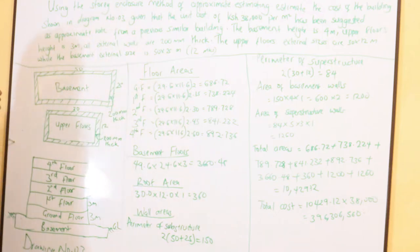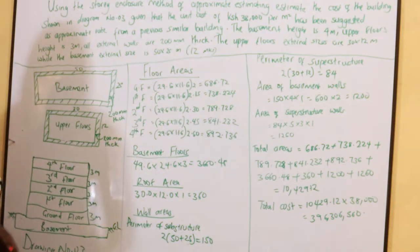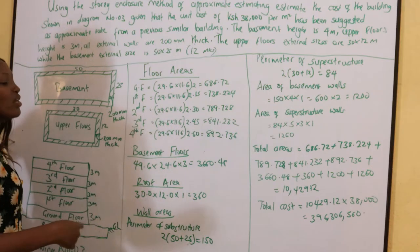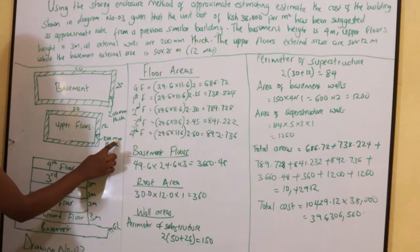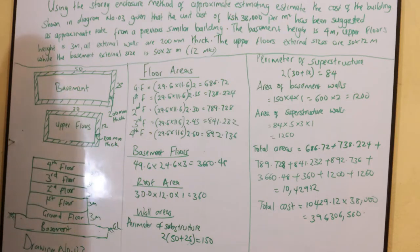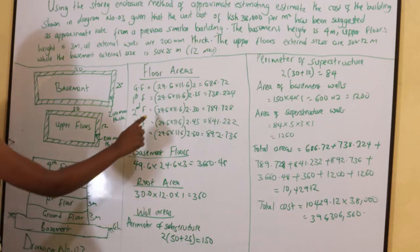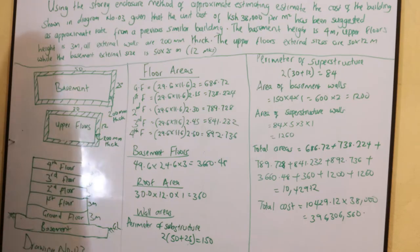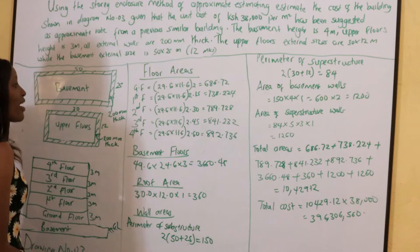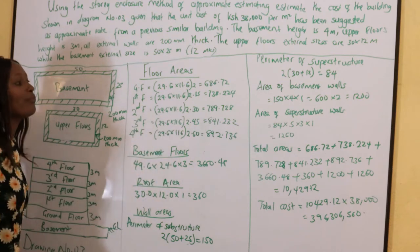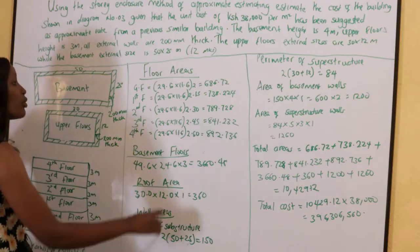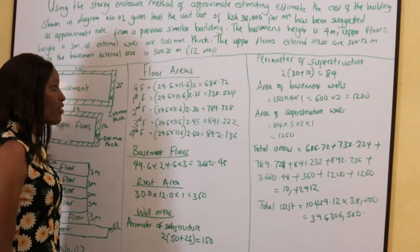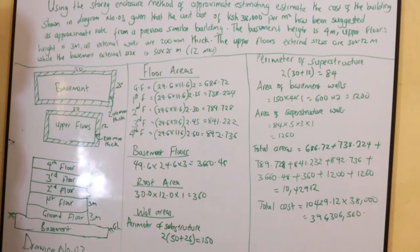We start with the floor areas. For the ground floor — which is among the upper floors — we use internal areas. The external dimension was 30 meters, and deducting 400 millimeters for wall thickness on both sides gives 29.6 meters. Similarly, 12 meters minus 400 millimeters gives 11.6 meters. The ground floor area is therefore 29.6 times 11.6, weighted by a factor of 2, giving 686.72 square meters.